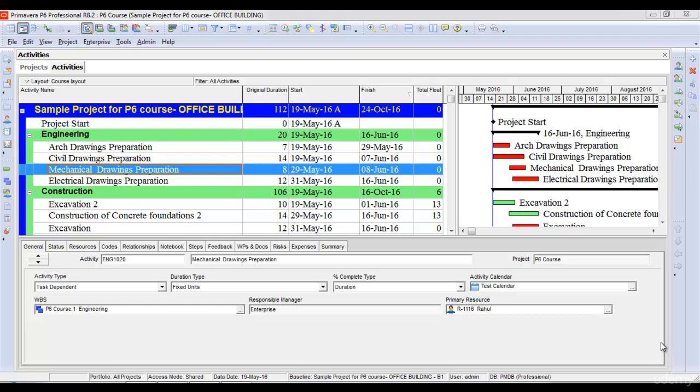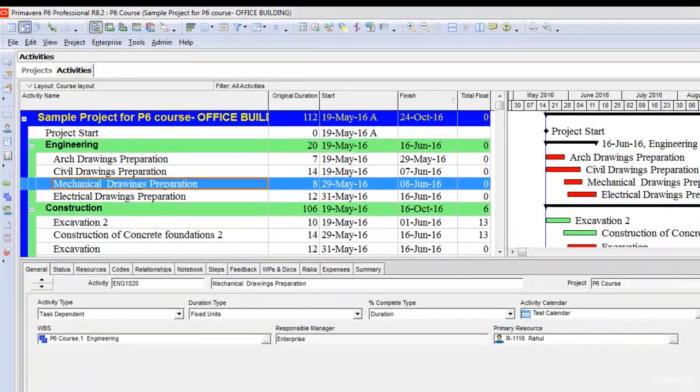If you are a consultant and a contractor submits your schedule and later submits an update after one month or one week and you want to know if he has changed any activities or changed any duration in the original schedule or baseline, you can do that by using the tool called ClaimDigger.